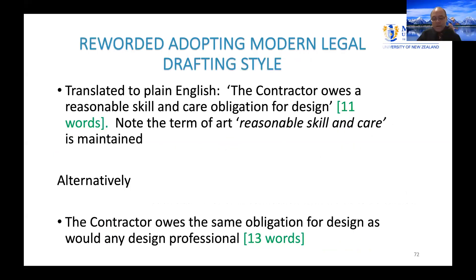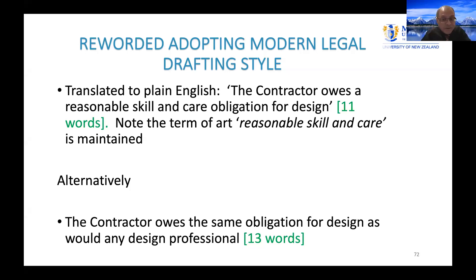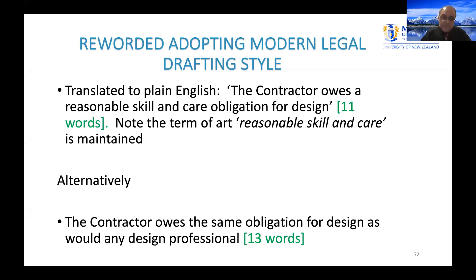If you want to pick up legal principles, use a plain language contract. That is why I will be using the plain language contract called the SDCC, which you can download. The contract has only seven clauses, and I'm quite confident we'll get through it over the remaining four days. But don't overdo plain language — 'the contractor must be careful when designing' does not mean the same as 'the contractor must exercise reasonable skill and care,' so don't lose the legal meaning.